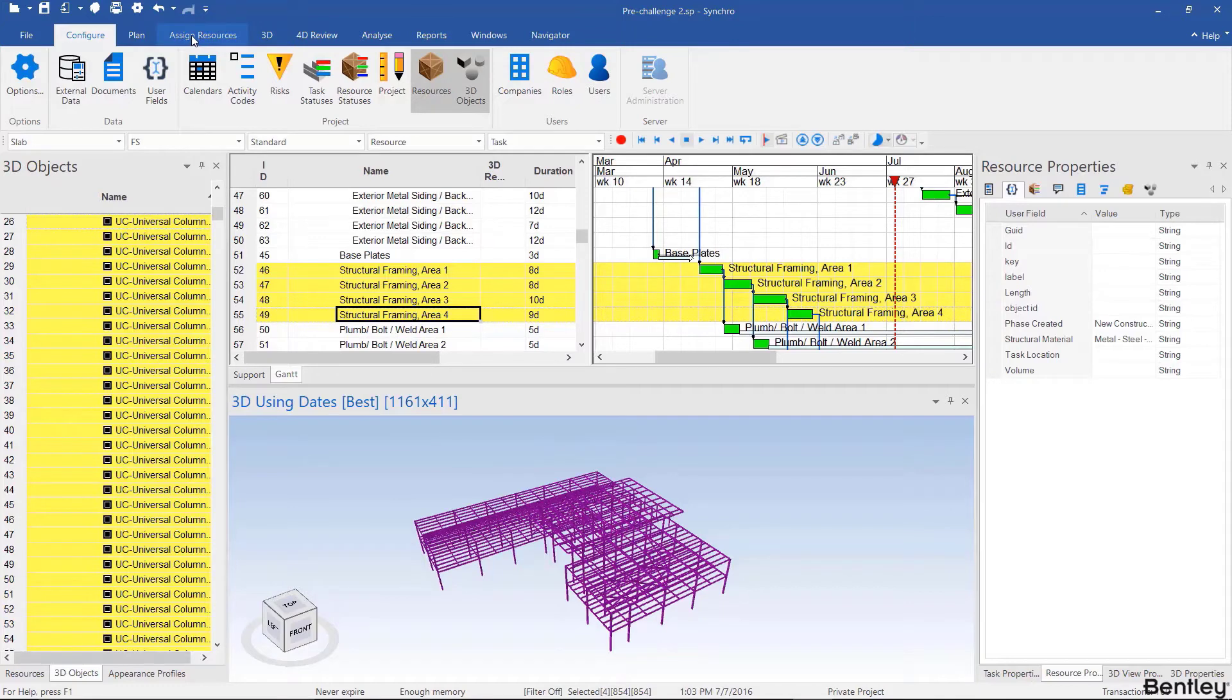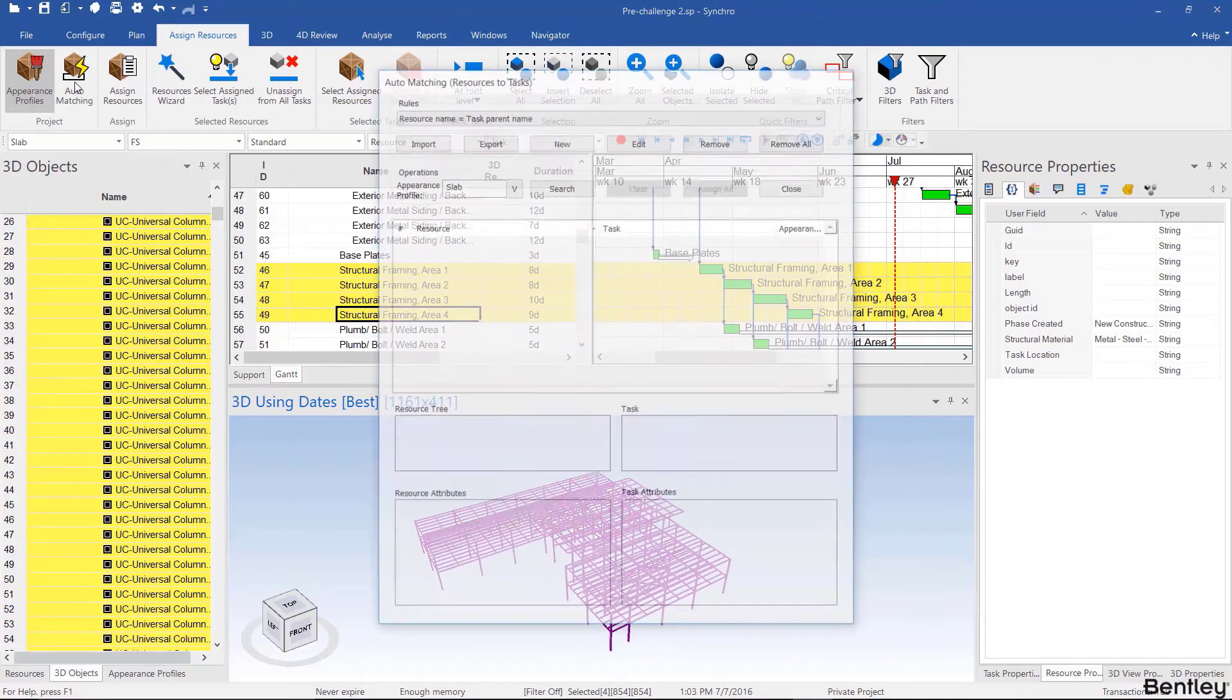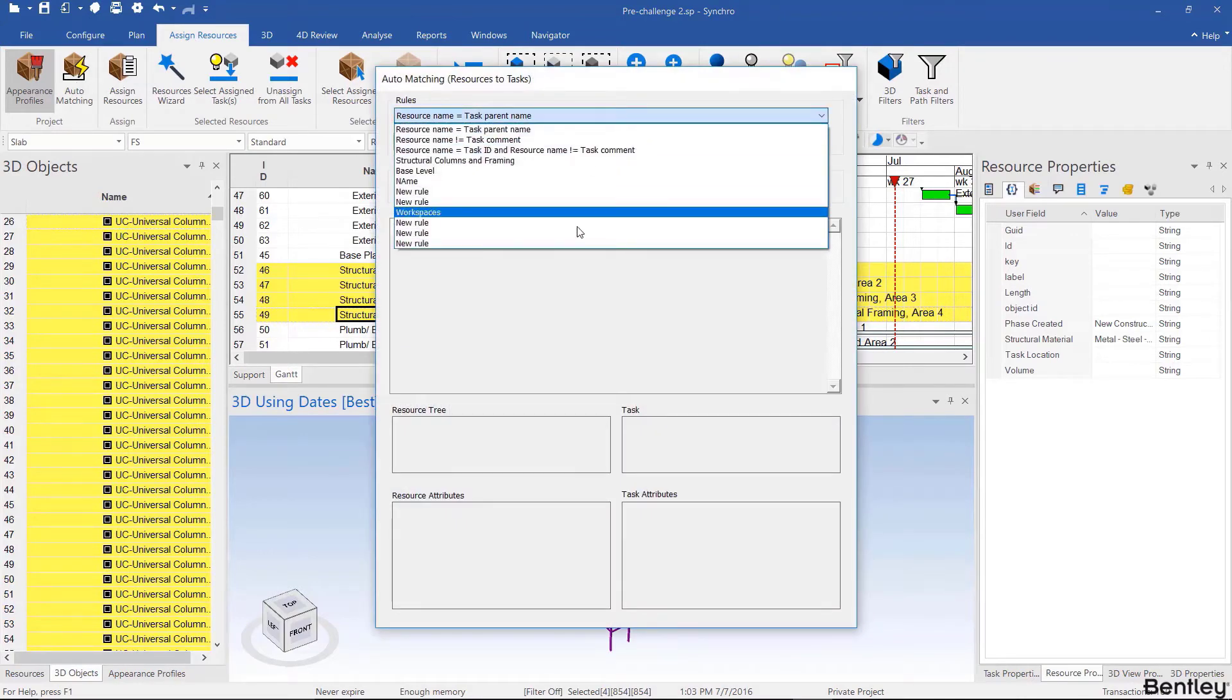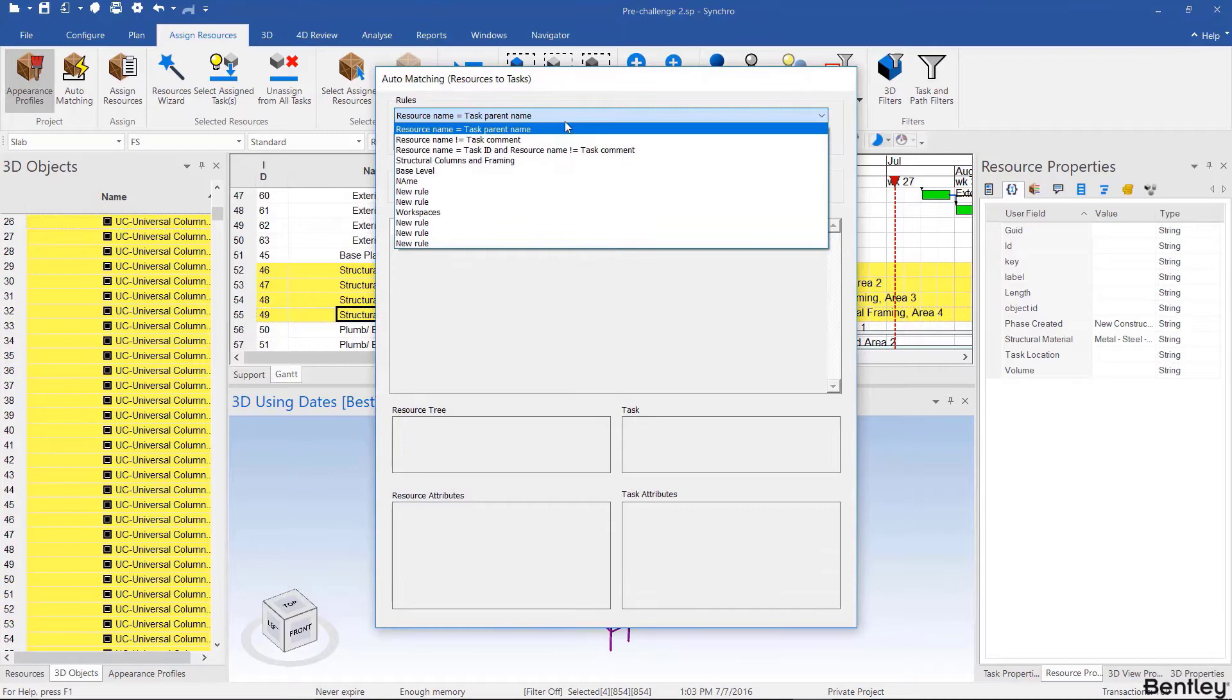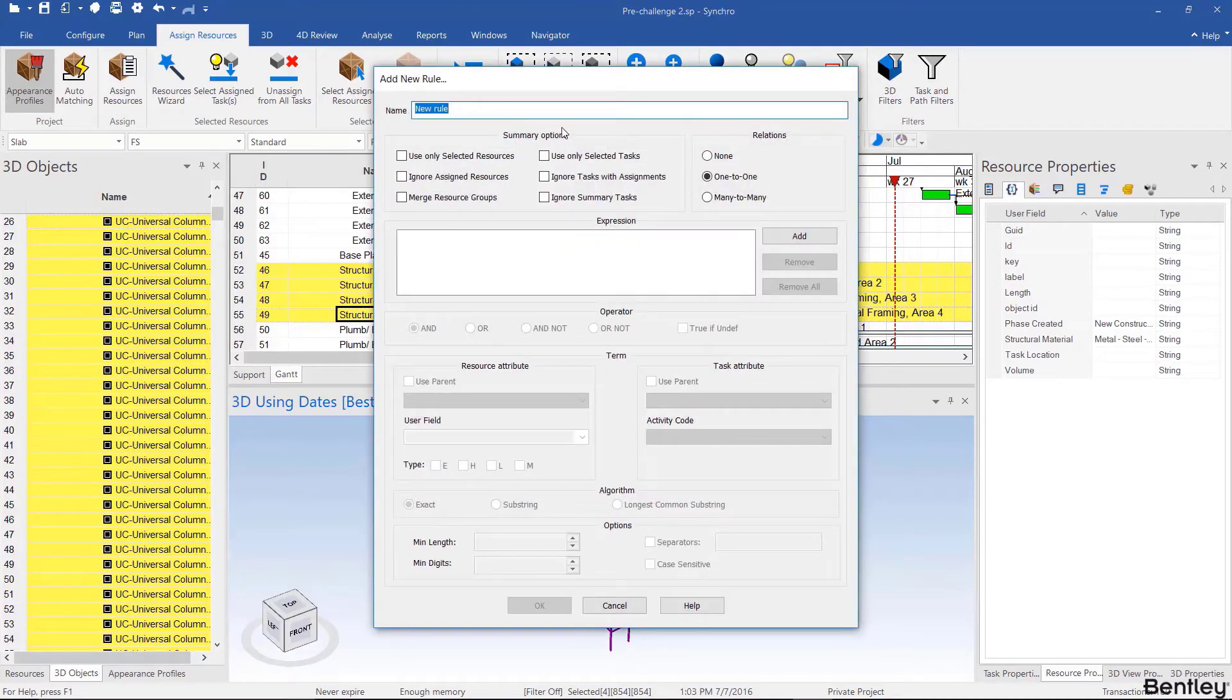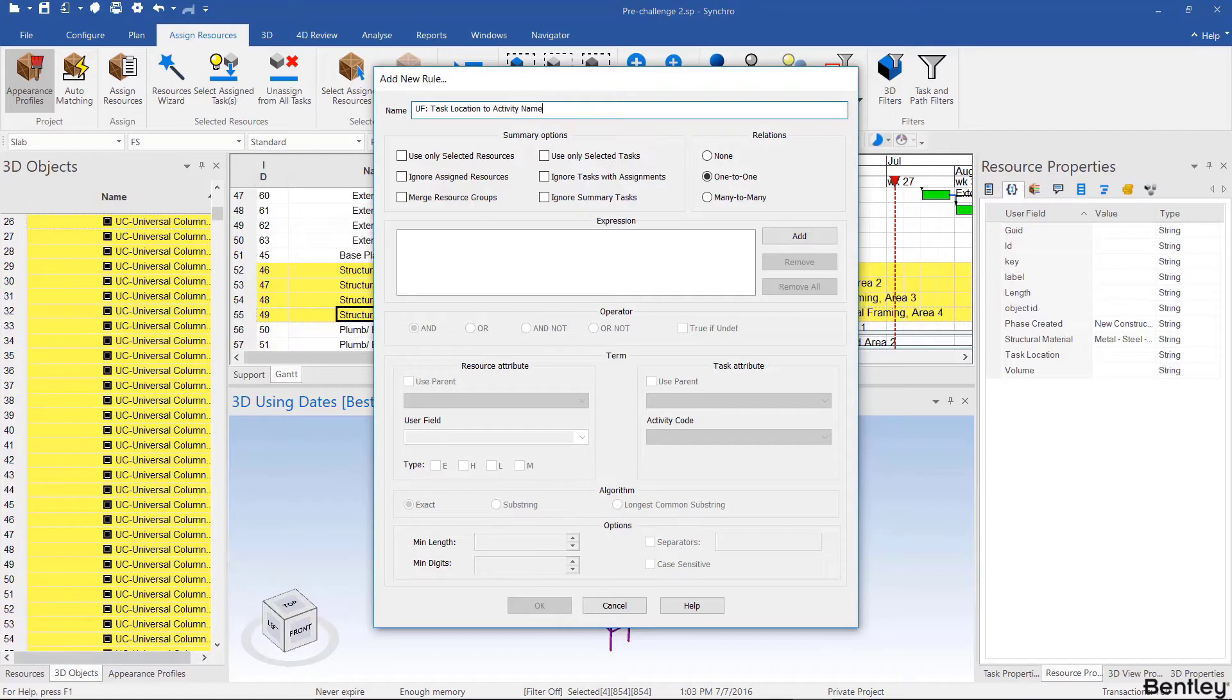We're going to be assigning resources, so that's under the assign resources tab and then auto matching. Let's create a new rule. You can use previously created rules or sample rules, but let's create a new one. Let's call this something meaningful, which is user field task location to activity name, because that's what we'll be matching.